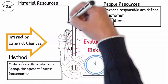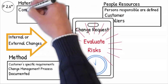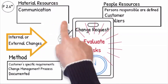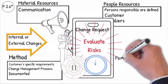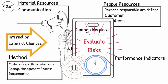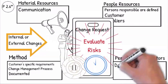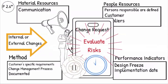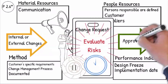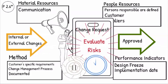Changes are reported in a timely manner and are agreed upon with the customer. Adherence to defined design-freeze steps must be ensured. Exceptions must be agreed upon and documented between the customer and the supplier. All changes will only be implemented once they have been approved by the customer.